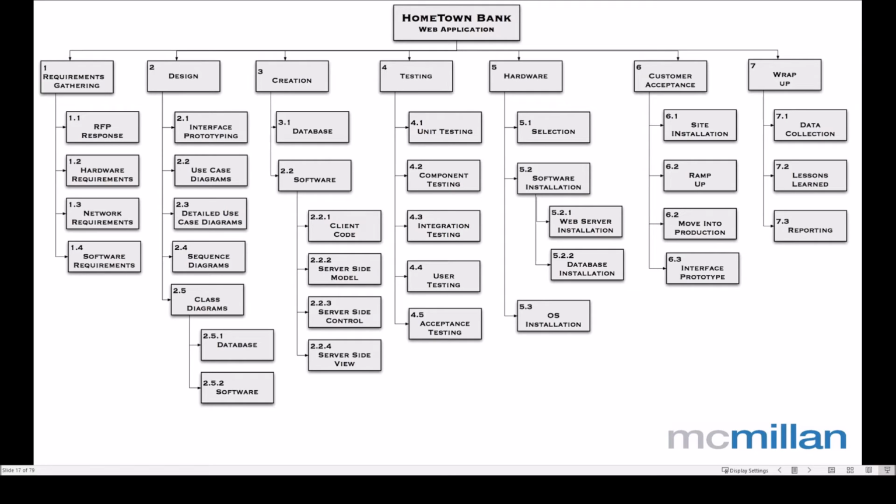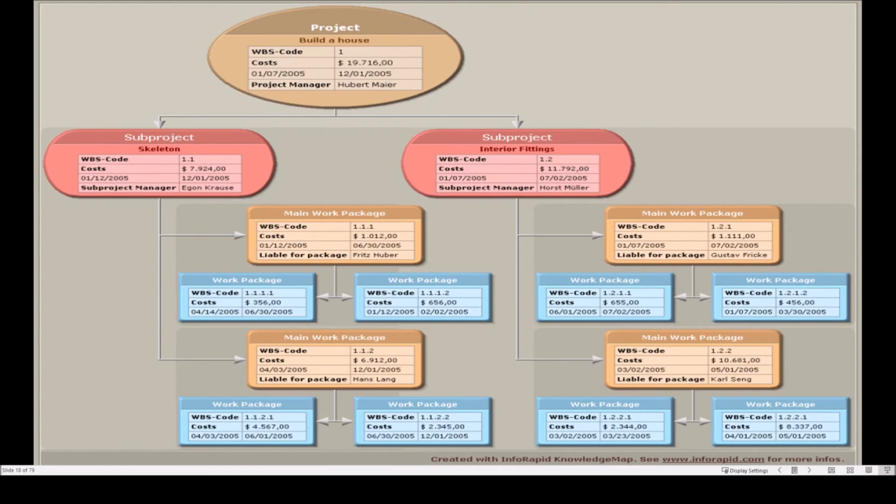We may even consult some of our suppliers who may have quite a deep understanding of what we're trying to do with the project and be able to share some of the experience with us. So we undertake this decomposition. Once the deliverables and the tasks are unpacked, such as this, we then start from the bottom and we start to build up the time required to do it. So, I'll go to the next slide to demonstrate this.